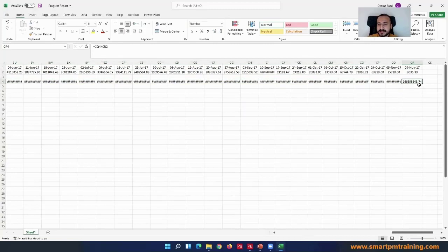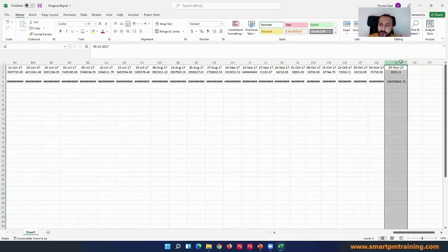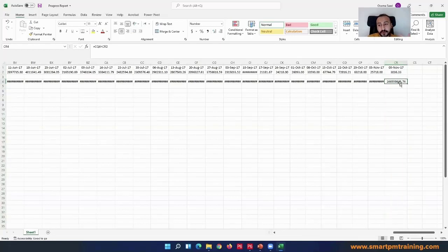Okay, and this is my contract value, because the planned cost has been assigned from the beginning as per BOQ. And right now, the cumulative of all costs should match the contract value, which means when I do my progress on weekly basis, at the contract end, I should have cumulative the contract value to be claimed for, to be accomplished.